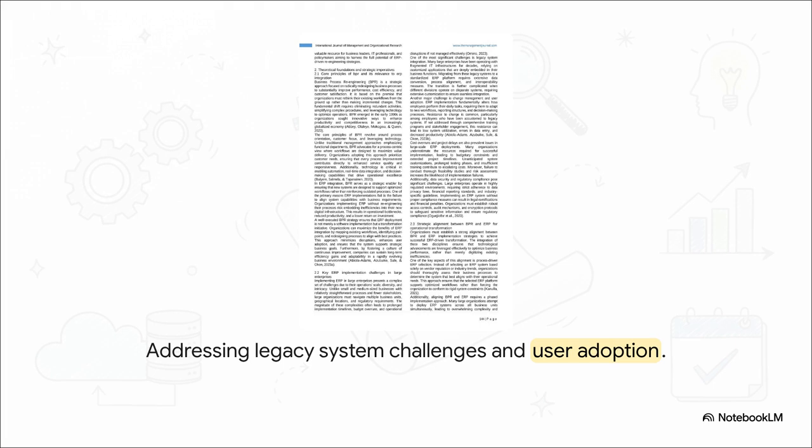We completely reject the catastrophic Big Bang rollout method that destroyed value at Hershey and Nike. We mandate a phased, highly methodical approach designed to guarantee operational stability. Large enterprises operate with deeply fragmented IT infrastructures. They rely on customized, siloed applications that have been embedded in their business functions for decades.